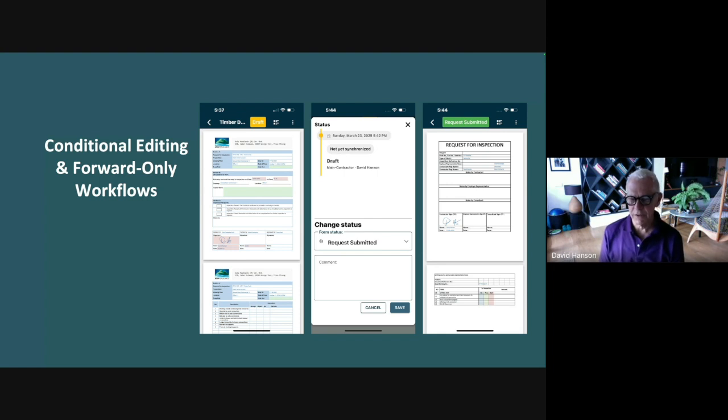Okay, so by the same token, and we'll talk about this in a moment, if you have a multi-form inspection, let's say a setting out and level inspection form, where you've got form 1, form 2, form 3, form 4, you have this situation where the first form can be closed, passed, and then you open up the second form, and that can be closed, fail, and then you have to go back in and fix that particular form.